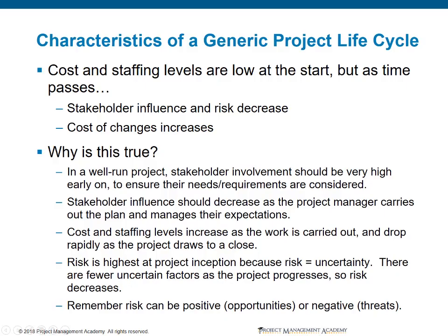However, as we conduct planning, it's going to get more difficult for the stakeholders to make changes to it because the cost of change will go up. Imagine for a second, if you will, that we've completed quite a bit of feasibility study and the blueprints are halfway done, and a stakeholder wants to move the entire project to another metropolitan area. Is it possible to submit this change request? Absolutely. But it's going to become very expensive because all of the planning we've done thus far will have been wasted. So as time passes, the ability for stakeholders to influence a project in one direction or another will decrease.